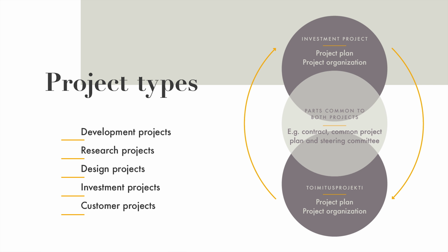As for research projects, their goal is to create completely new knowledge, expertise, solutions, and in them there is often a great deal of uncertainty. Also, the ultimate goals of the projects are not very clear in the early stages of the project, but there are only ideas of desired future states, but no ready solutions even as to how to attain these. In these cases, the management of people and experts often takes a central role, and you cannot necessarily even set very exact control points in the early stages of these projects.